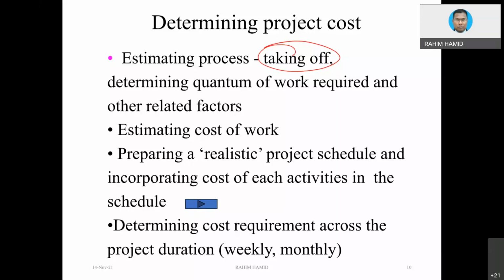Normally it would be monthly, okay, because we want to generate the S-curve. So the S-curve is basically cost versus time. If you do not split those things in accordance to the activity, then how exactly are you going to see, or even develop, the S-curve? It is almost impossible, okay?